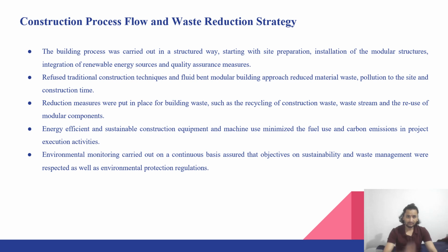The building process was carried out in a structured way, starting with site preparation, installation of the module structure, integration of renewable energy resources, and quality assurance measures. Compared to traditional construction techniques, the modular building approach reduces material waste, pollution on the site, and construction time.